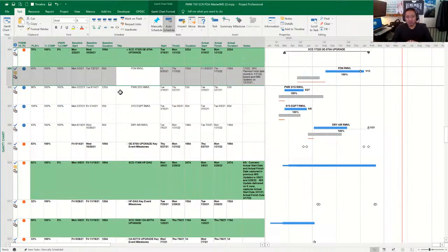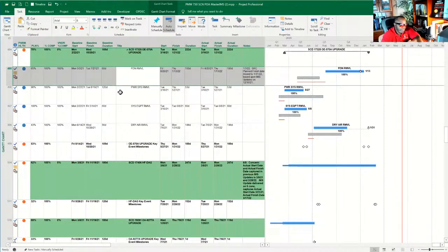That's beneficial to your schedule, but having an excessive amount of soft constraints can also disrupt your critical path. Absolutely. Which is why we often advise folks starting off, don't begin whacking dates into the start and finish columns, because that's immediately going to do that. You have a lot of users who just type dates manually into the tasks, and they don't know this. So when all is said and done, they have a schedule with a critical path that doesn't reflect reality, and is so constrained.